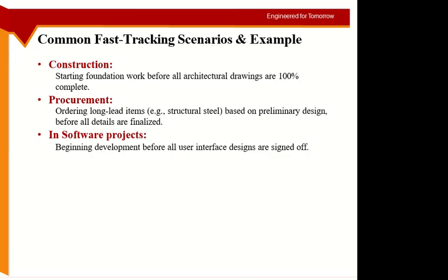Okay, other examples of fast tracking, for example in construction work, you start doing the foundation work before architectural drawings are ready. Architectural drawings will give you elevations, doors, windows and these things, but the structural work is already complete. So you don't wait till the details. I need architectural drawings at the time of finishing, once I have done the substructure and superstructure. By that time it will be finished, but I already have the details for the structural work. I can start with the foundation work, even maybe the whole substructure.